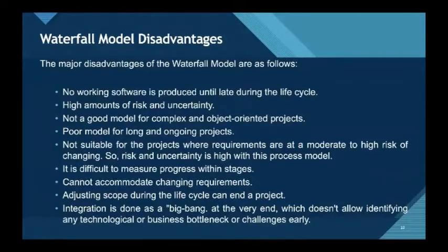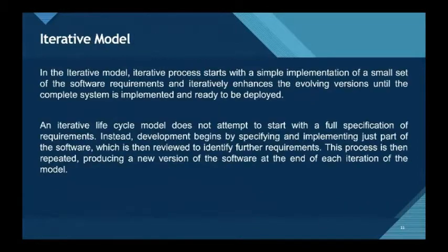It is difficult to measure progress within stages, cannot accommodate changing requirements. Adjusting scope during the life cycle can end a project. Integration is done as a big bang at the very end, which doesn't allow identifying any technological or business bottleneck or challenges early. Next, we have the iterative model.